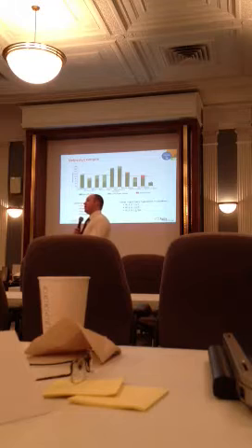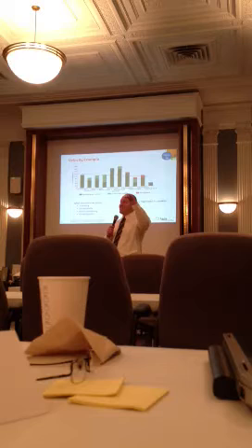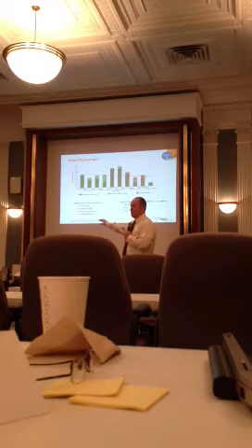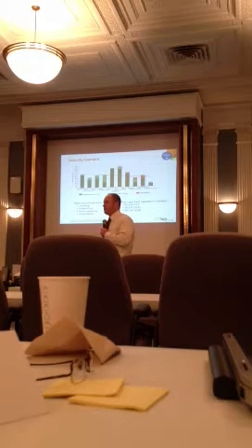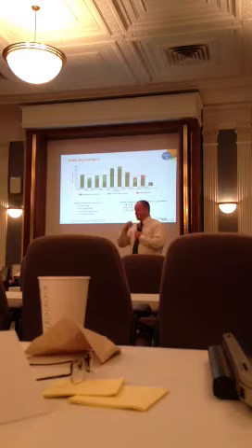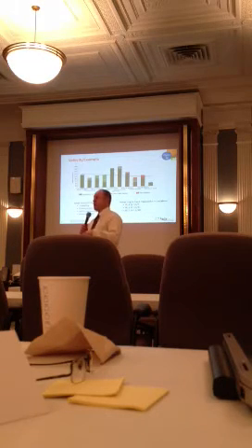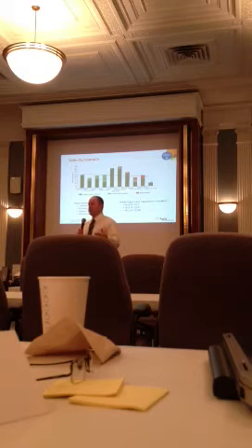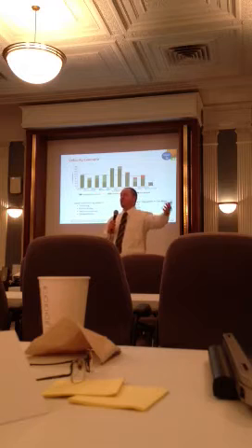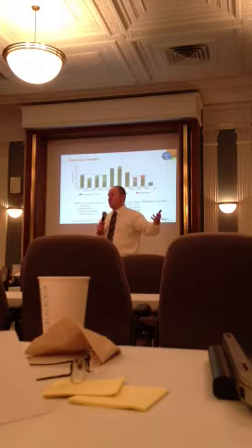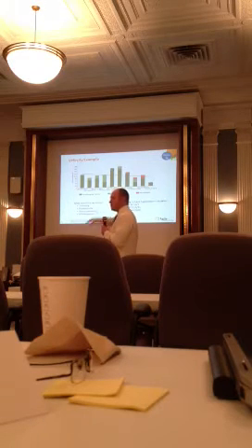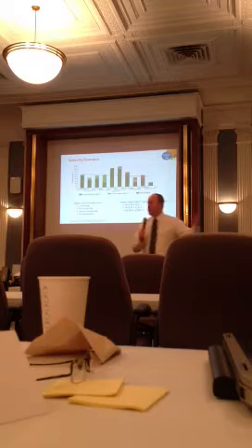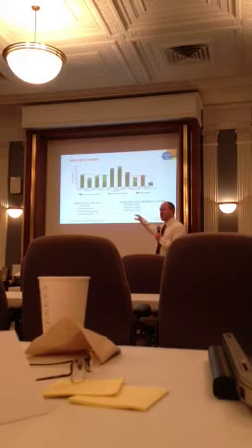Remember yesterday, and Jake will talk about this a little bit this afternoon, we're baselining at our M3 milestone at a high enough level that allows us the flexibility of making these changes as we iterate. There's still scope change in terms of they want this additional piece of functionality. But if you think about the business case for the ARO tool, the idea was we're going to create this application that's monitoring resources so that we can use it as a marketing tool to promote active participation in our application developers program at AT&T. We're still meeting that business case, regardless of what gets added from a requirements perspective. So we baseline our epics at that level, which gives us the flexibility to change as we deliver the actual tool.